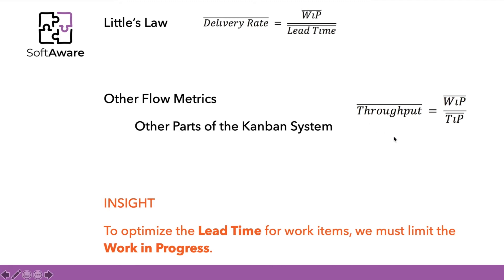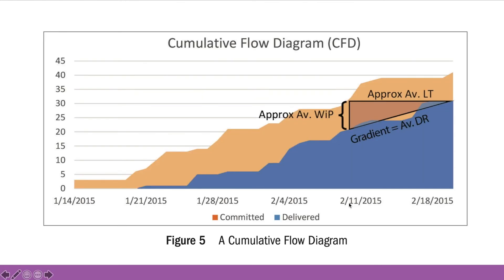By recurring to the average amount of work items in a specific stage or stages, and calculating the ratio of the average time that these work items stay in that stage or stages, we can actually compute the throughput for specific parts of the Kanban system. This leads us to the conclusion that to optimize lead time, one must ensure that the work in progress is limited, and this controls one of the variables in the equation. Figure 5 presents an example of a cumulative flow diagram where you can see those metrics visually.